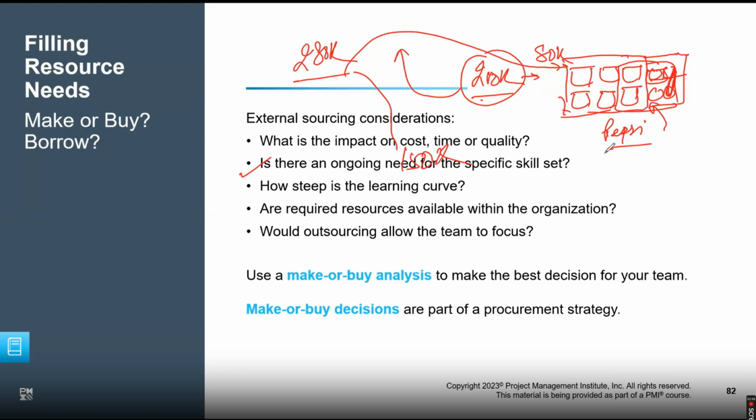So they will have that capacity. Even in leaner months, they will be able to catch up because they have so many clients. You are doing it for yourself; it does not make logical sense. So they prefer to get it from outside. For them, it's a buy decision, which makes logical sense rather than doing it themselves.